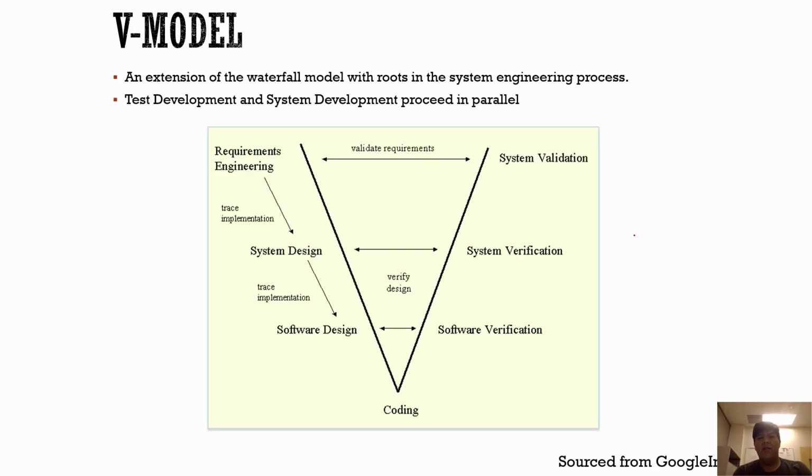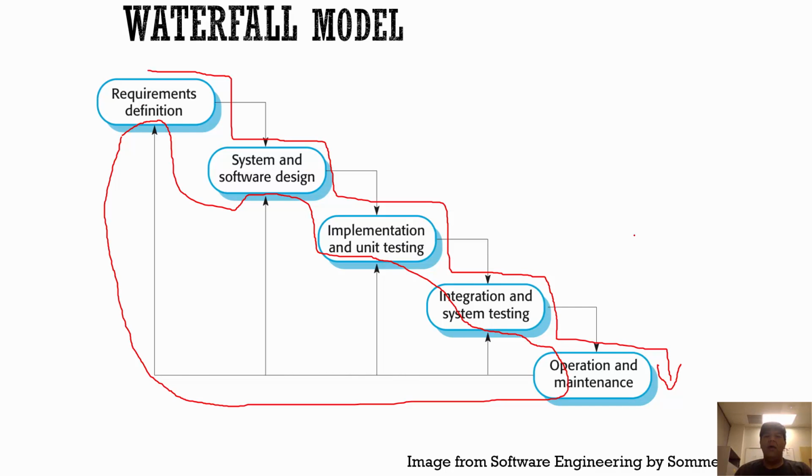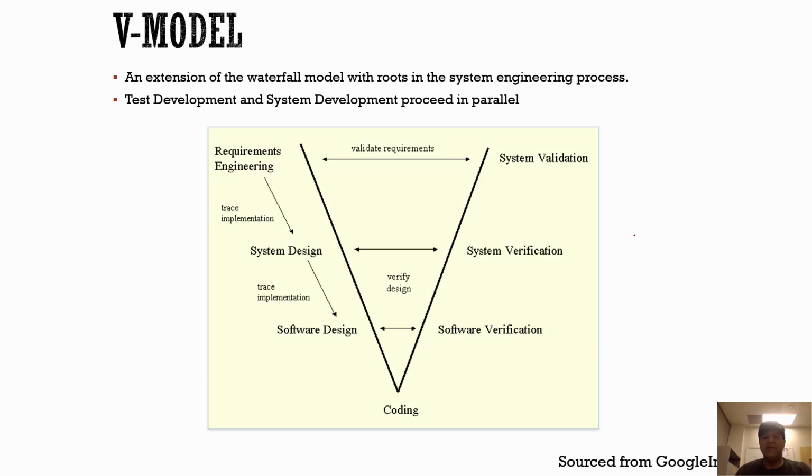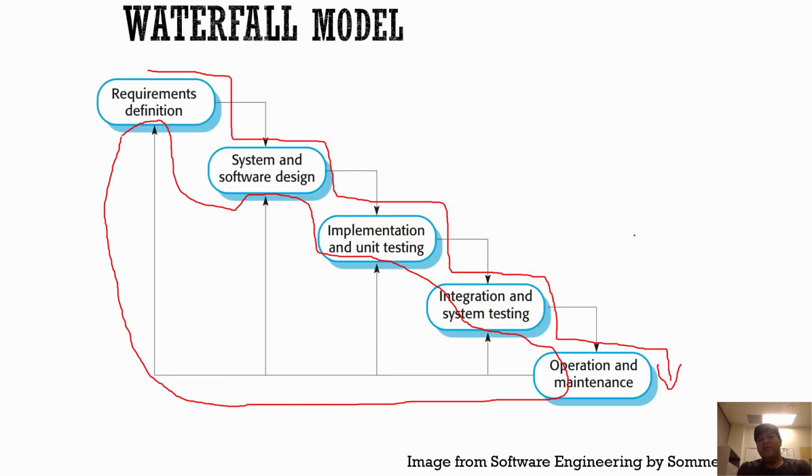So coming to the next slide, we have the V model, which is really an extension of the waterfall model we just talked about in the previous slide. So in V model, well, actually, let's jump back to waterfall for a second. So one of the issues here in waterfall is the following. We do our requirements gathering, we do our systems design, we do our implementation, we do integration, and then we have some testing left to do, right, if we follow this flow. Sometimes what happens in a waterfall scenario is that's where we run out of time, right? We've invested all of our time in the other steps, we get down to testing, all of a sudden it gets kind of squeezed down, right, until I don't have all that much time and money left.